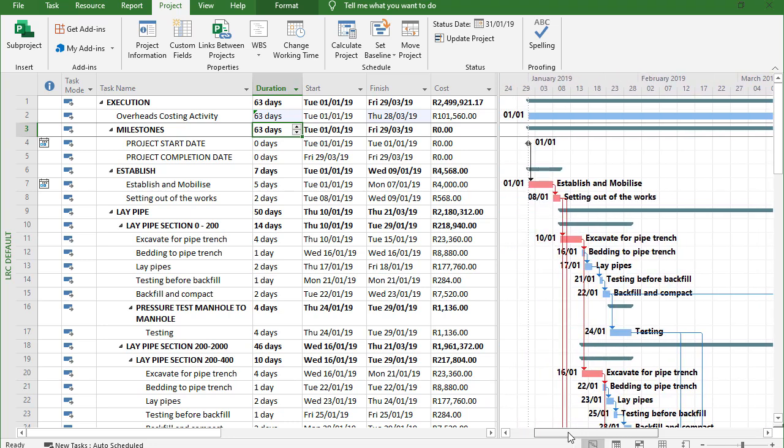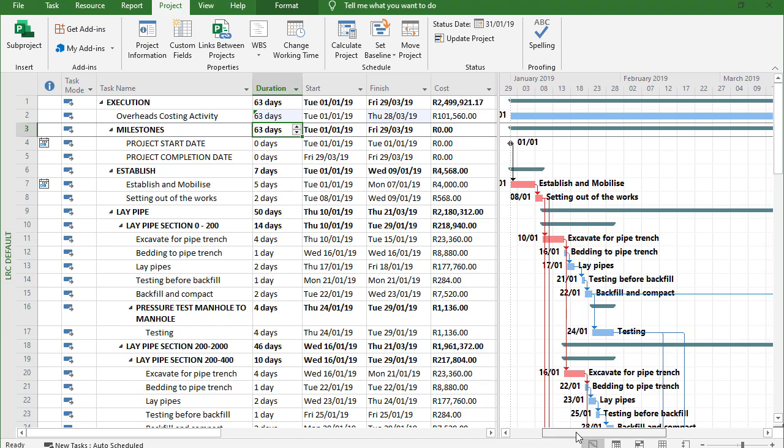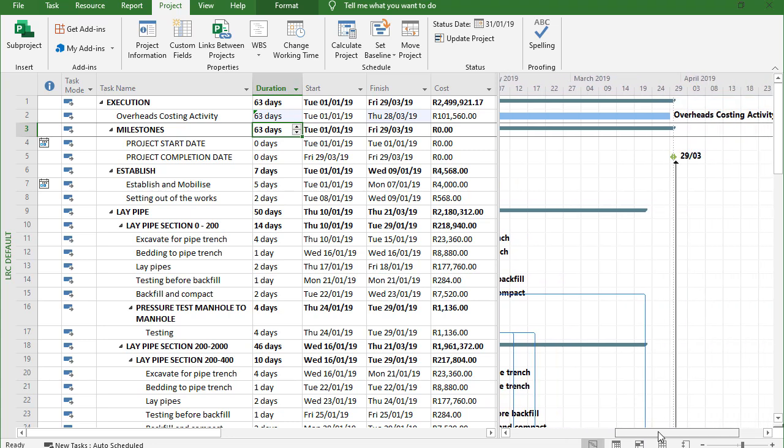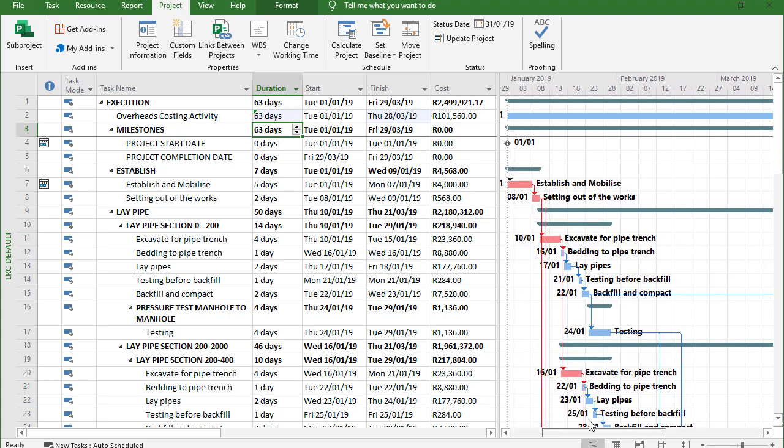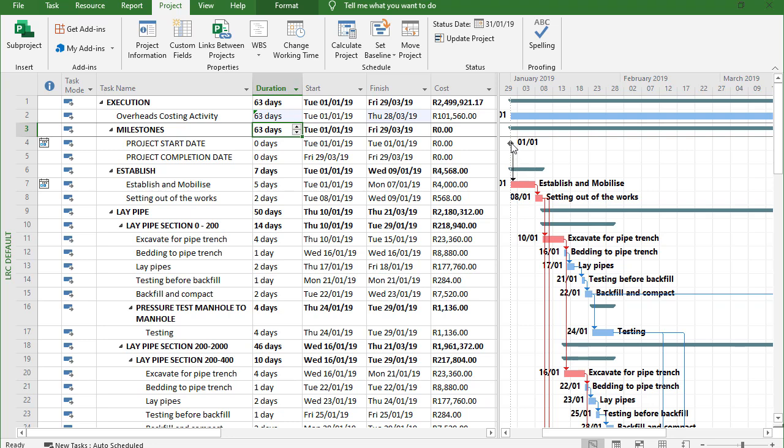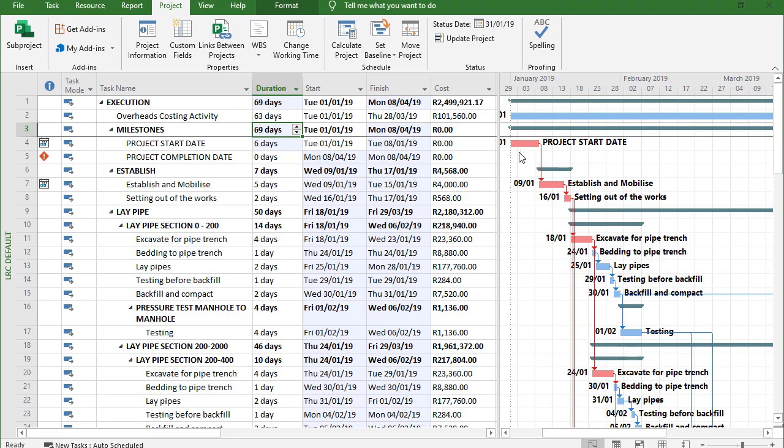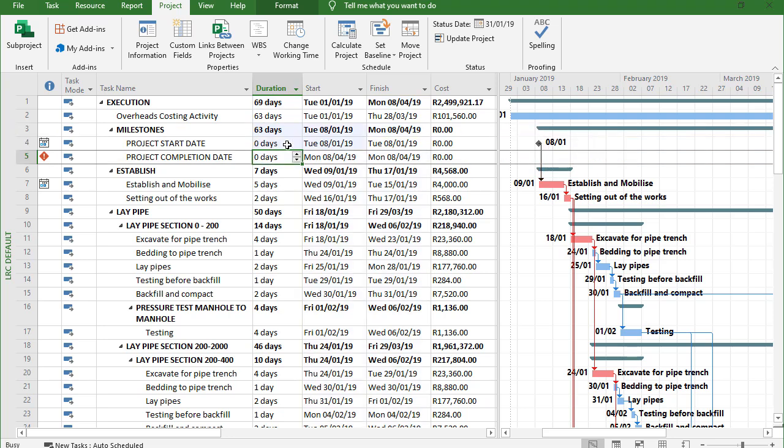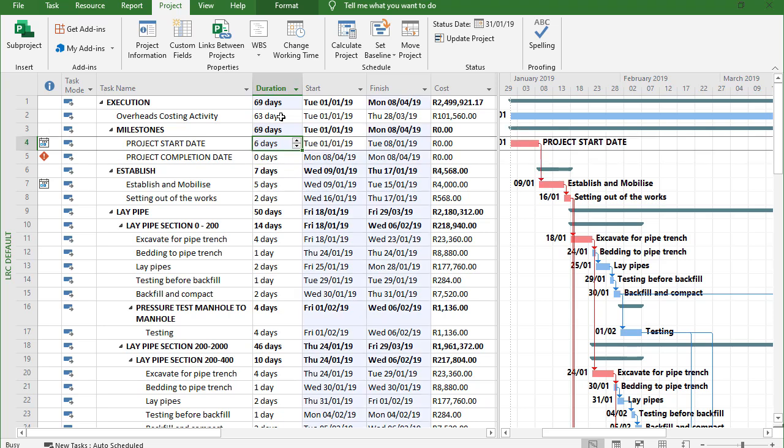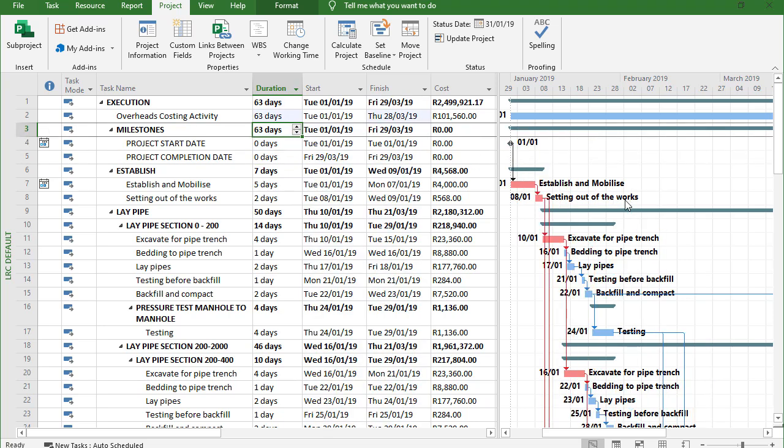However, I would prefer to rather link my overhead costing activity to the start date and to the completion date. Because if this project starts a bit later I want that activity to move with it. So if something like this needs to happen then I would like that start date to also move in my hammock, otherwise I need to go and adjust that back manually the whole time.